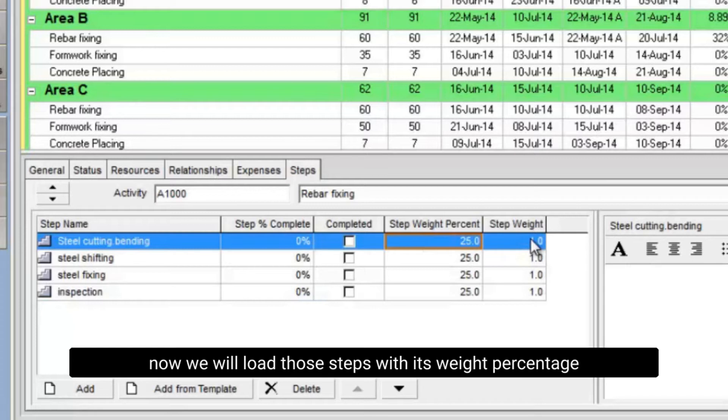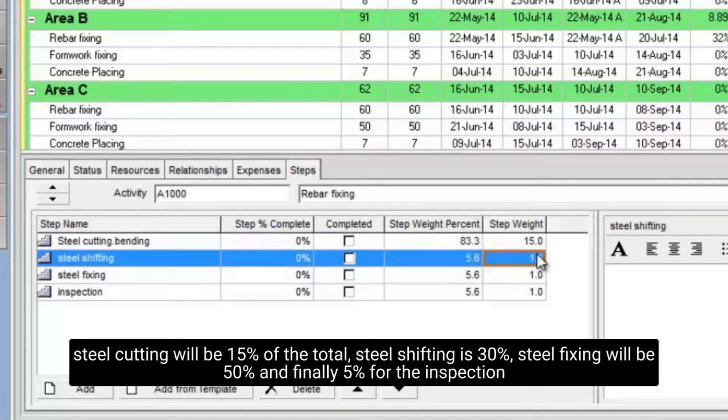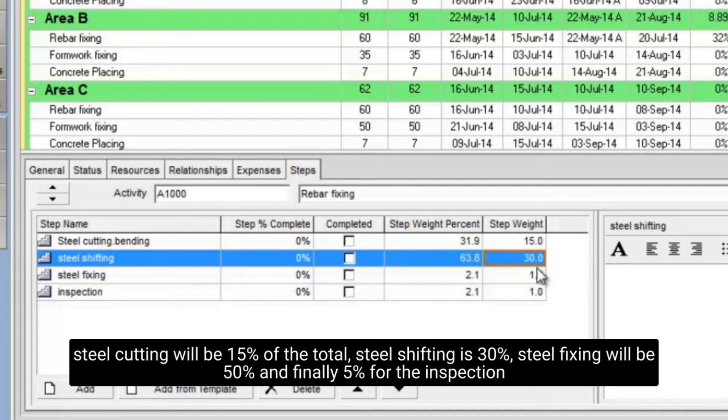Now we will load those steps with its weight percentage. Steel cutting will be 15% of the total, steel shifting is 30%, steel fixing will be 50% and finally 5% for the inspection.